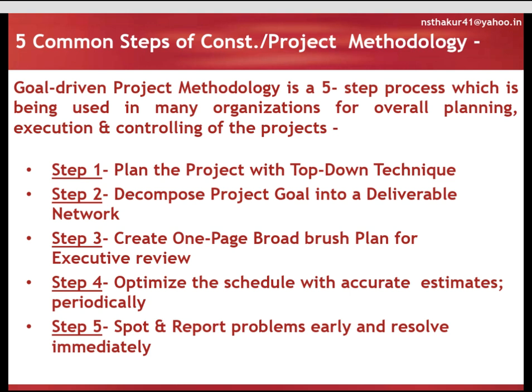A top-down approach, also known as a stepwise approach, is the breaking down of a system into its subsystems and further drilling down into various lower levels of the system for more detailing. Step 2. Decompose project goals into a deliverable network. The project manager decomposes the project objective into a network of major deliverables that identifies the major stepping stones and milestones.